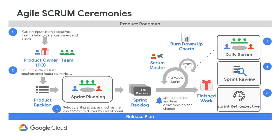In addition to tracking progress, several ceremonies are core to Scrum — these key ceremonies are listed in steps four, five, and six. In step four, the daily Scrum is a daily 30-minute activity where each member talks about the progress they made, their tasks of the day, and any blockers. This is the time for the team to take the pulse of the progress, drive action, and ask for help.